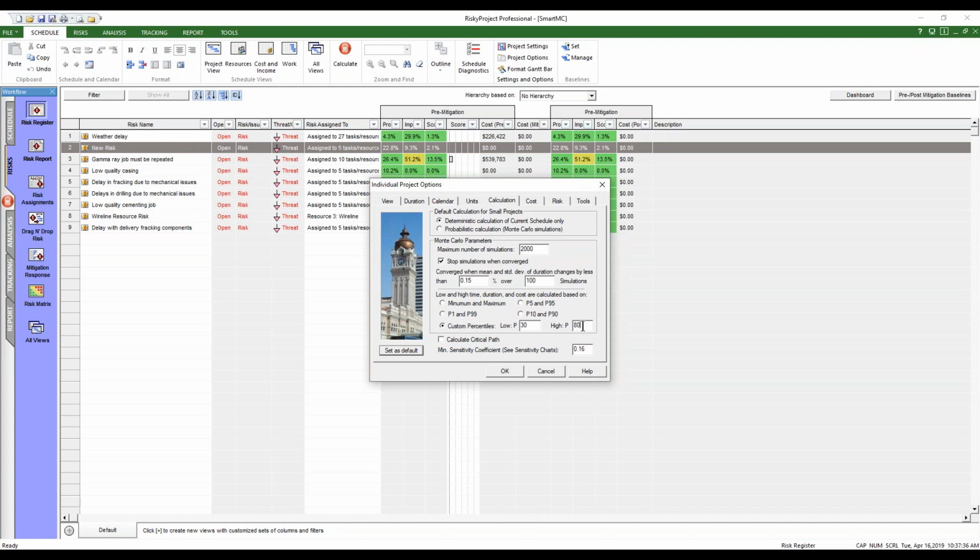If you look at projects, if you had a track record of meeting schedule and cost 8 out of 10 times, that would be considered quite good. The more risk tolerant you become, you might go down to 70, I've seen. You could put it down to 50 if you wanted. But again, we're just going to use P80, because it also allows us to set markers when we look at the results of the simulation.